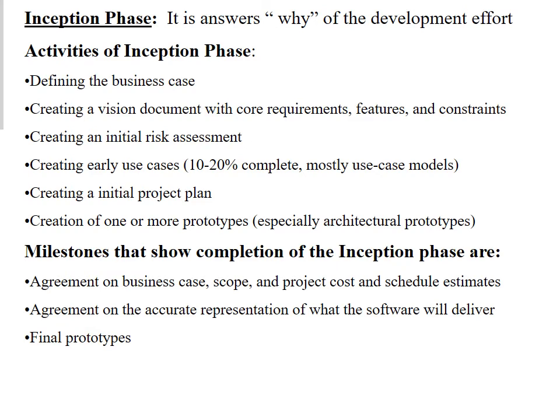This is the first and the shortest phase in the project. It is used to prepare the basis for the project, including preparation of the business case, establishing project scope and setting boundaries, outlining key requirements and possible architecture solution together with design trade-offs, identifying risks and development of an initial project plan schedule with main milestones and cost estimates.